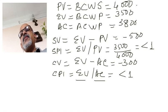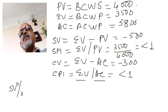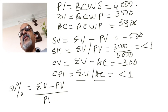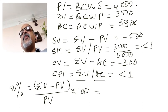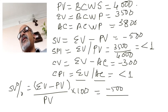There is also Schedule Variance Percentage = (Earned Value − Plan Value) / Plan Value × 100. In this case, that is (−$500 / $4,000) × 100.